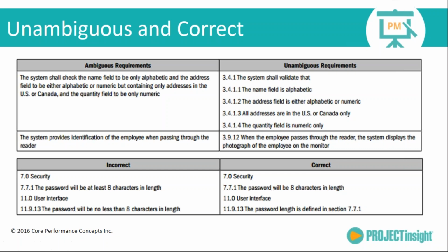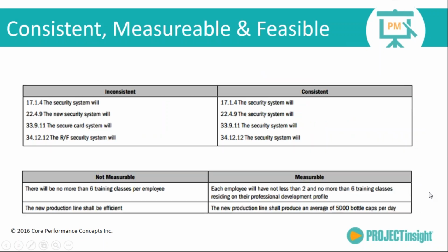It only opens yourself up for inconsistencies later on. Somebody goes through section 7 and makes a modification to "the password must be at least 12 characters in length," not realizing that it is also referenced in section 11, and now your requirements are not consistent and not accurate.